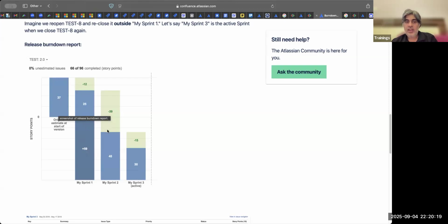Now in the next sprint, they did not add anything. So now something like 84 was pending here, 59 and 25. Now we did 39 and 45 was pending. So these charts are basically used by release managers and management to look at how much work is pending, how much work was added. So on sprint 1, these many tickets were added by the PO. Sprint 2, nothing was added, but this much was done by the team and this much is remaining.